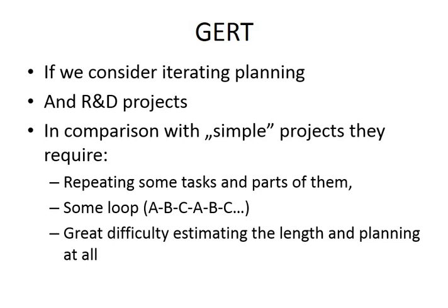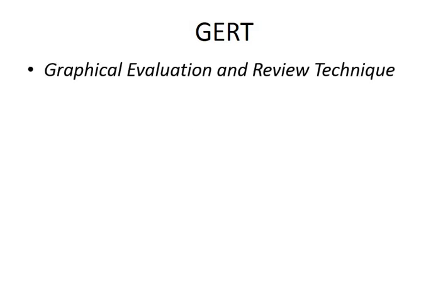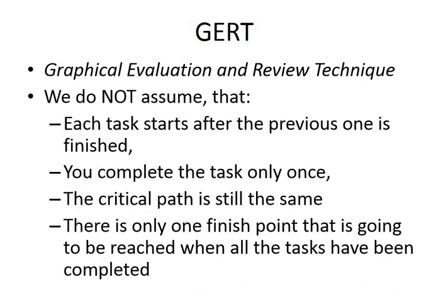There are some loops, and there is great difficulty of saying how long it is actually going to take. The name comes from graphical evaluation and review technique, and in GERT we do not assume that each task starts after the previous one is finished, so we can start faster, or the previous one doesn't need to be finished every time.